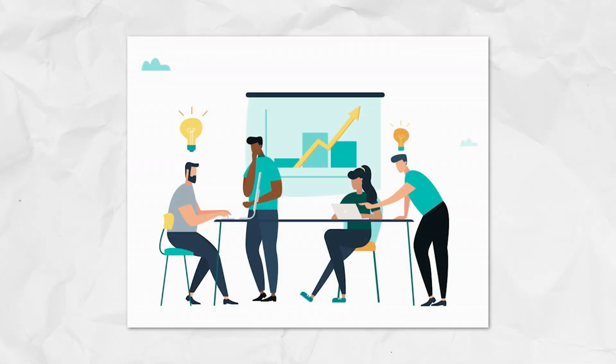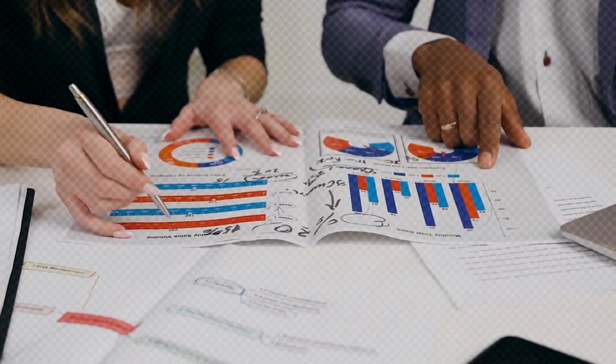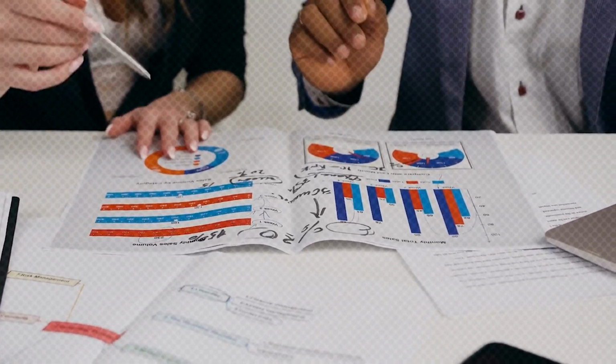So you need to have those conversations so that stakeholders are very much involved and you're able to gather their feedback. If they've said, yeah, this is wonderful, cool, all right. But if they have said, oh, maybe is this something that we can change? So you make a note of it. You don't commit in the meeting saying, all right, tomorrow I'm going to make this change and you can check tomorrow. No, you just make a note of it and you're gathering the feedback. And after that, whatever the process of triaging it is, that's what you do. But gathering that feedback is a very important step that the product manager needs to own.